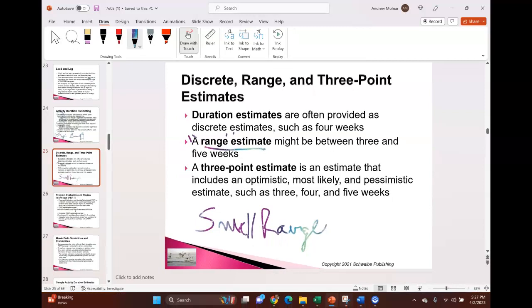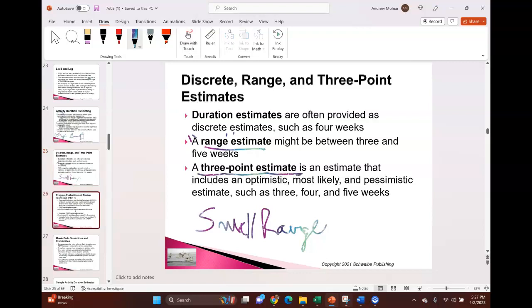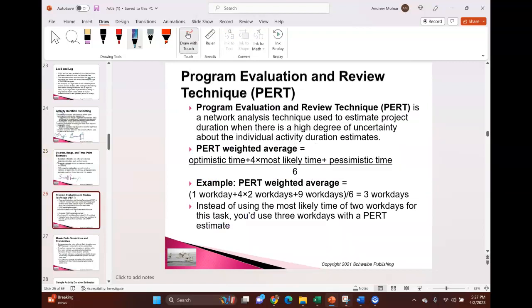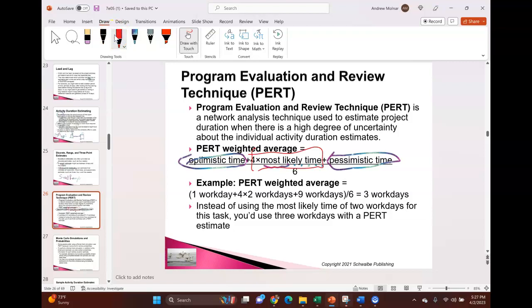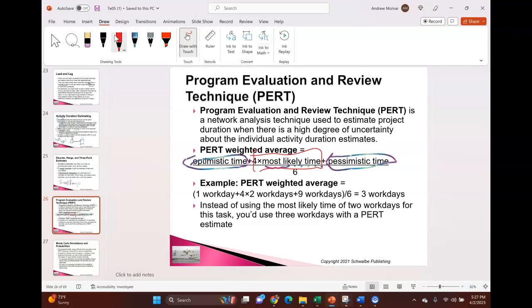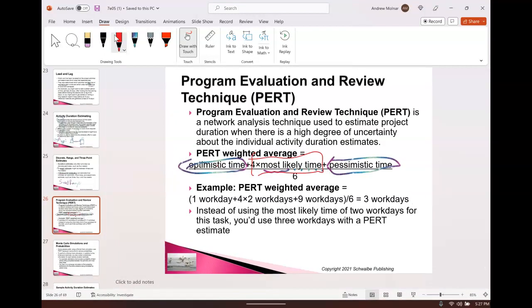A large range means risk. One way to reduce that risk is a three-point estimate. The best three-point estimate is called PERT — Program Evaluation and Review Technique. You take the optimistic time, the pessimistic time, and the most likely time. Multiply the most likely by four, add the optimistic and pessimistic, then divide by six. Why six? Because there are six data points total: one optimistic, four most-likely, one pessimistic. You're computing a weighted average.